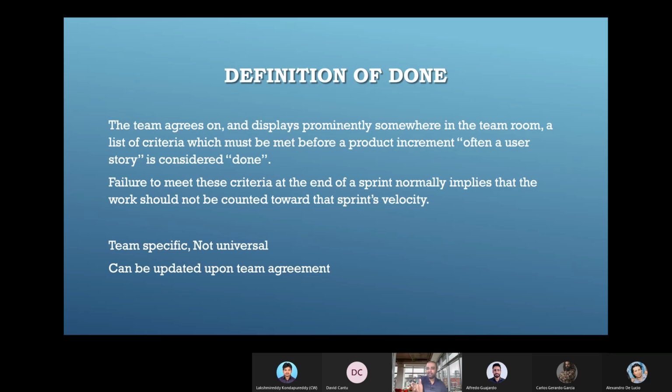So always, whenever we are giving a demo and review, we should ensure that we have enough buffer time to incorporate any review comments. You will get review comments when you do the PR review, or when other team members review the actual code. Apart from that, you will get review comments from another team member who is doing the testing for you, or lastly the final review comment when the product owner is going to see it. In different organizations it will be different.